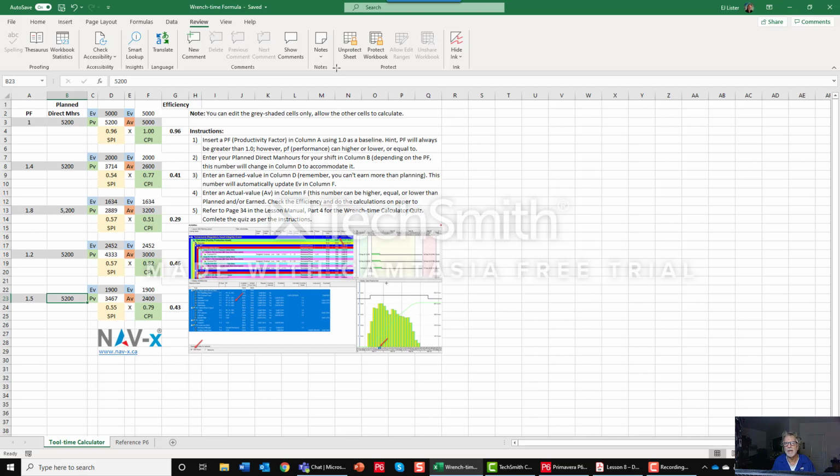That will be handled as a productivity factor, non-productive time, while I'm scheduling, and that gives me the opportunity to run what-if scenarios and change on the fly to add productivity during an opening phase that might be twice as much as the productivity during a closure phase. Because when I open, in a refinery, for example, everything is hot and smelly and frozen bolts and issues around blinding.